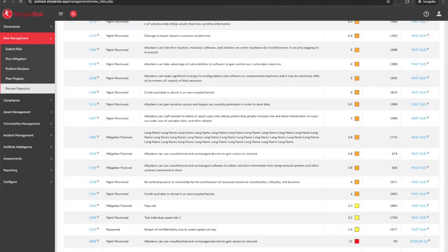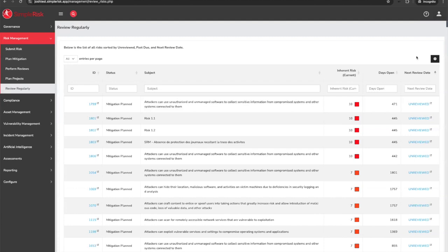So general best practice here is you schedule a monthly risk review meeting. You review all the risks coming due over the next month or so, anything that's unreviewed or just the newly submitted risks since our last meeting, and anything that's past due or just the few risks that have lapsed since our last meeting. And if you follow that monthly cadence, all of your risks should show future dates.